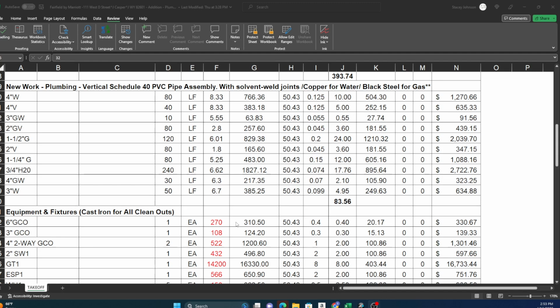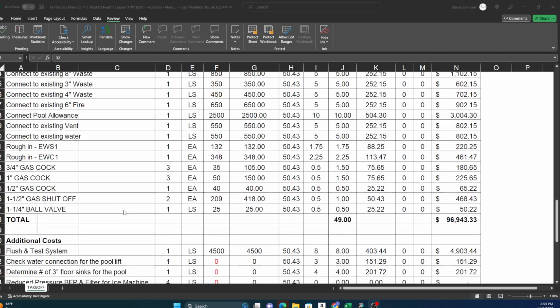Okay, and so when you're looking at your estimates, you're going to think in terms of things like your grease waste, possibly your gas, but your vent pipes, definitely the ones underground. Anything that is from the civil set coming in, for certain, that is your rough end. And so if you do a detailed estimate, you're going to know how many man hours for each operation. And so you just take the rough end minutes, subtract those from the finish, which is all of the, even the rough ends for the sinks, because that's a separate cost that you have to make sure that you have.